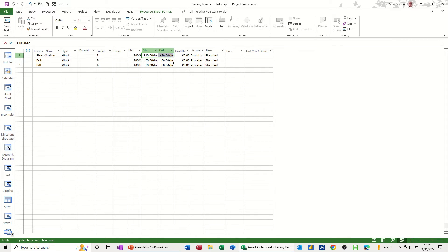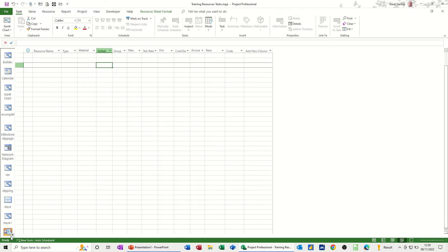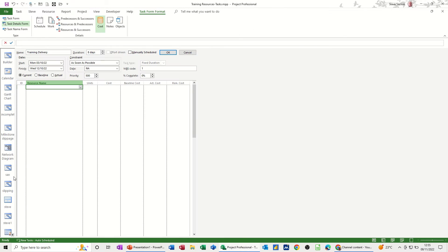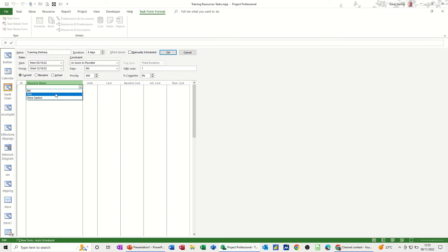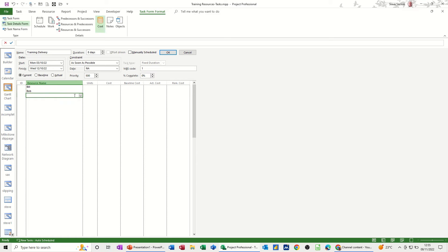Then if I go back to the task form, you've got the task form. Now what you'll see is that resource list now appears in here in this form, so you can just allocate people through this drop down. I'll just put everybody on this one.